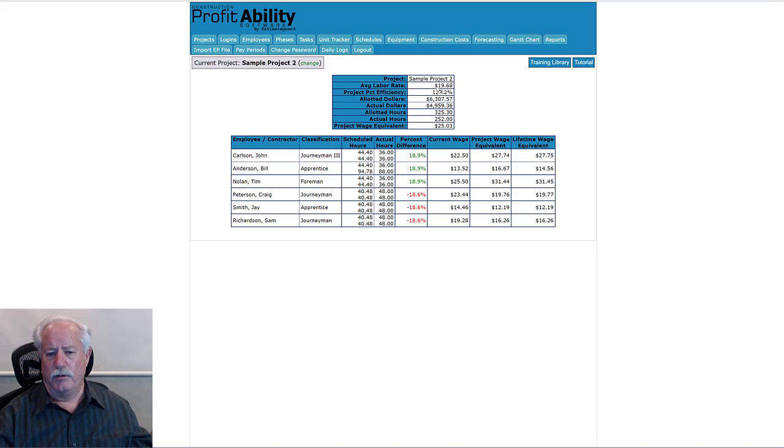So your average labor rate is $19.68. Your project percent efficiency is 127.2, meaning that you're 27.2% ahead of budget. Your allotted dollars for the tasks that have completed to date, per the estimate, were $6,307.57. The actual dollars you spent to complete those tasks was only $4,959.36. The allotted hours to complete those tasks was 325.3. The actual hours that you used to complete them were 252.